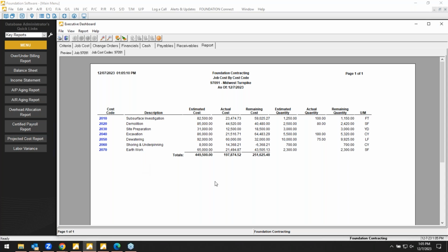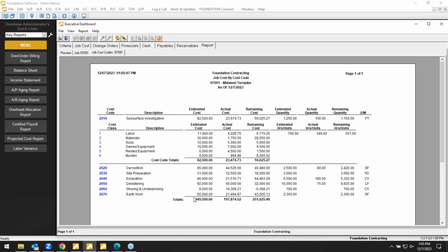These are only examples. And with easy data accessibility, if I were to click any of these cost codes, here's the breakdown of that specific code: labor that came in from payroll, material that came from accounts payable or inventory. I've got some subcontract cost, equipment. We also allocate labor burden down to the penny, taking into account workers' comp rates and unemployment rates. Those numbers will allocate following the labor to that job and that cost code.